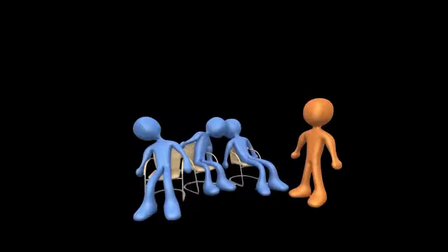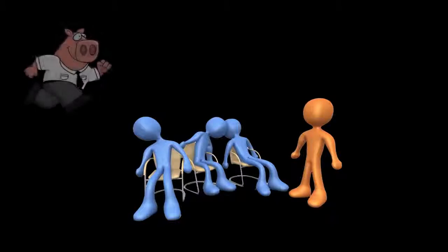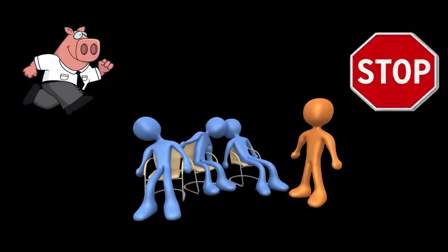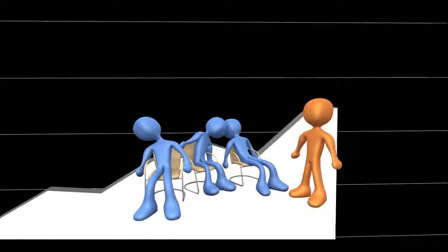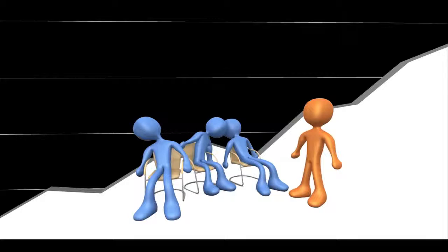There are two meetings that take place at the end of our sprint, the sprint retrospective and the sprint review. The main purpose of the sprint retrospective is to realize improvements driven by the team. During this meeting, the Scrum team discusses what they'd like to start doing, what they need to stop doing, and what they should continue doing. The team can then take the lessons learned and make concrete changes to ensure future sprints run smoothly.